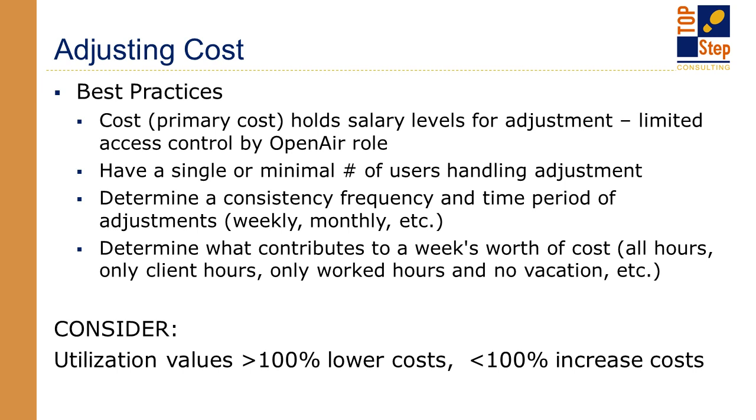Determine your frequency. Monthly is the most common time frame that we see. Consider what contributes to the cost. Is it all hours, client hours, worked hours, not include vacation, etc.? And if it is less than 100%, remember that lowers cost. If it's greater, then it increases the cost.